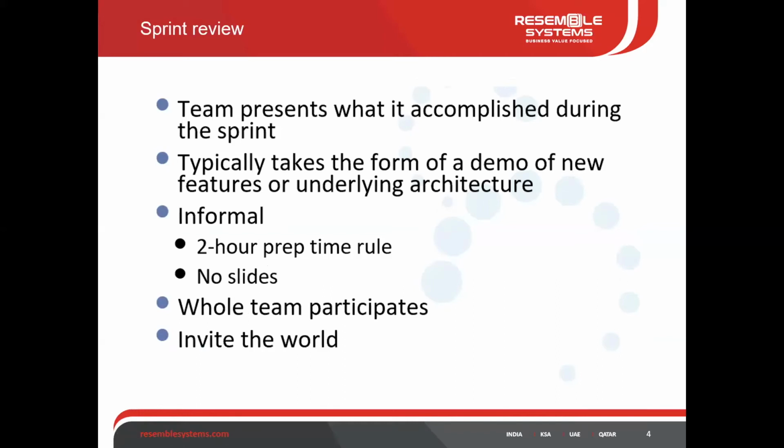Next, if you have any questions, you can just unmute and ask. Okay. Next we have the sprint review. Before rolling out the application or doing a demo, we need to do a review. By the end of the second week, teams do a review session telling what the team has done. They say, I have completed the login screen, I have completed the leave request module.